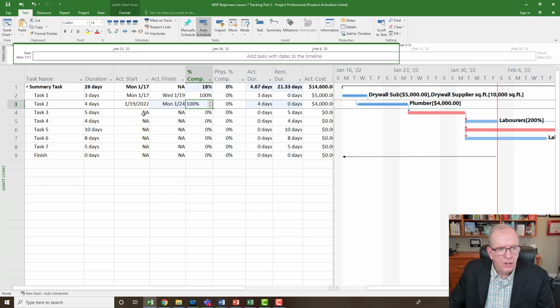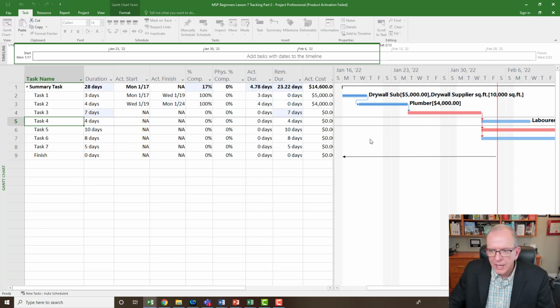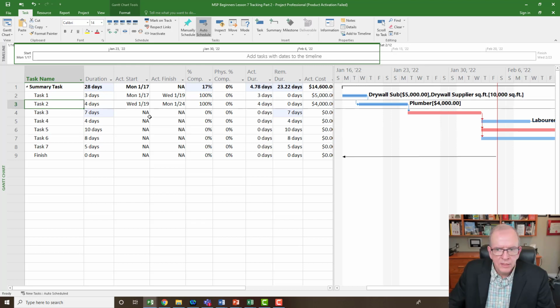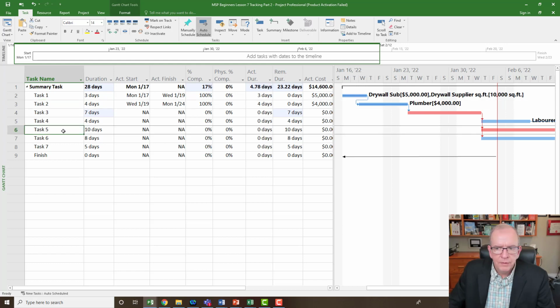All right. Now the plumbing activity, I'm going to say that we know that it took 2 days longer to complete. So I would probably just look at that and see how it pushed that out. And you know what? I'm going to say that task number 2 started a day early, that the plumber was working on. Task number 5 here, that I've kept the names fairly simple for, I'm going to say did not even start yet, and I'm going to move it. So I'm going to move this task, and because it's critical, it's going to impact the overall schedule. You'll see that later on.